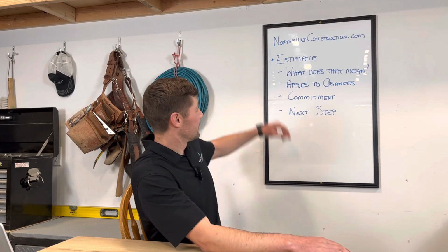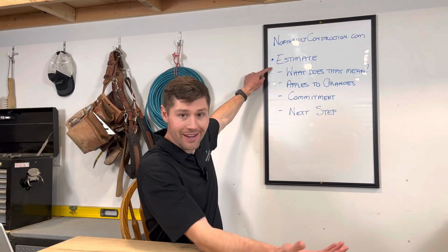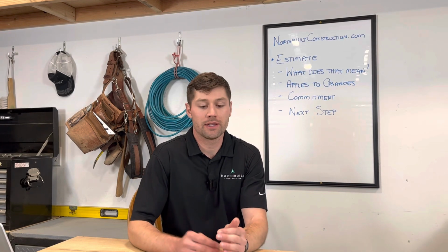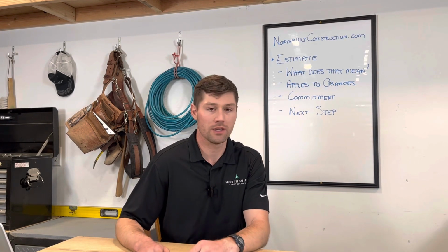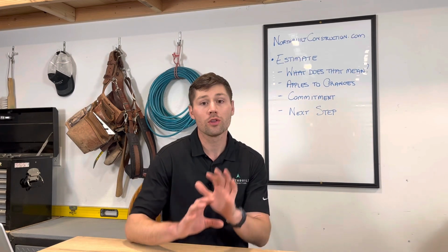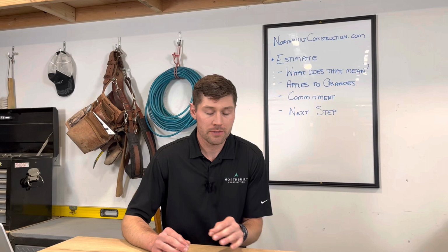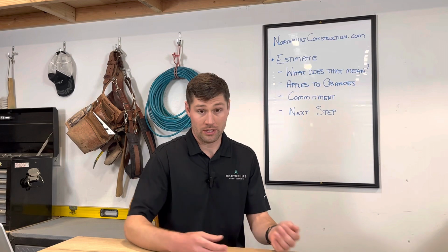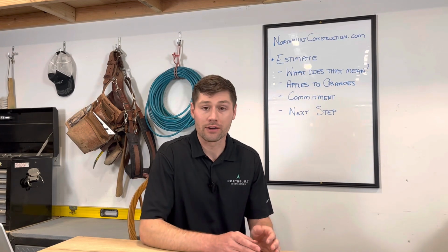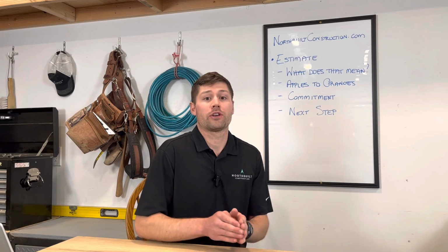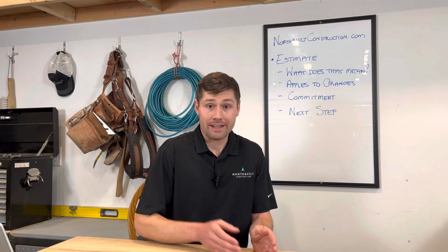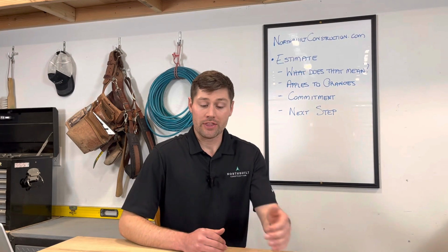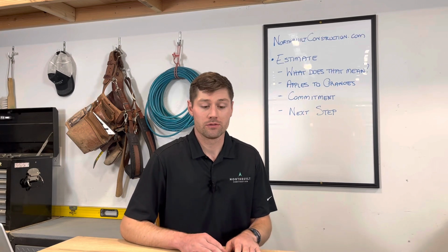Next step, estimate. What is an estimate, right? So I think there's some confusion around an estimate, a bid, a quote, a price, whatever you want to call all those other things that it could or couldn't be. An estimate is simply taking all that information we just talked about in the site walk or from the project form, our industry knowledge about a bathroom remodel, and saying, hey, we think you're going to land budget-wise between X and Y. And we feel that because here's the scope of work attached, and this is typically what the cost per item is based on what you'd like to do.